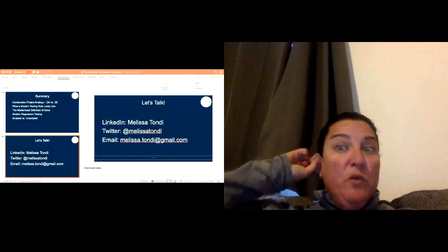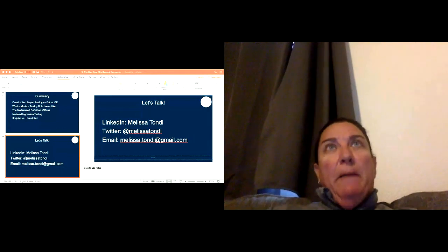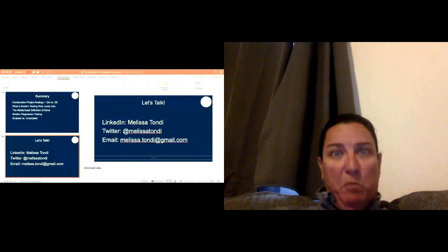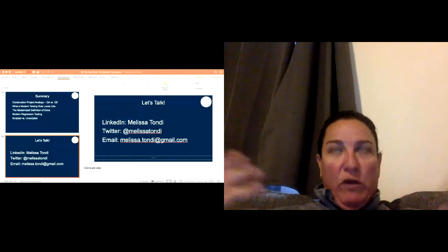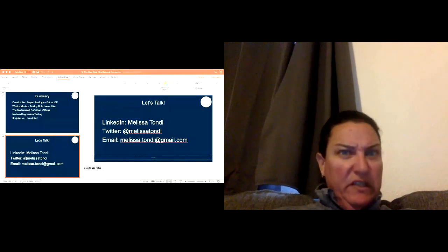There's one: if there's more than one team working on the same project, is it okay to have more than one definition of done? I would say that there are some components that should be shared amongst all teams. At some point, there should be a top 10 list of things that, regardless of which team is working on that, they should be able to consistently align with a general and agreed upon definition of done.